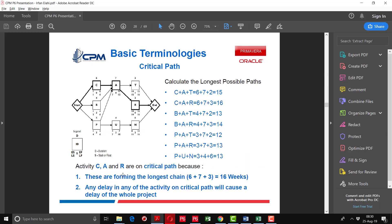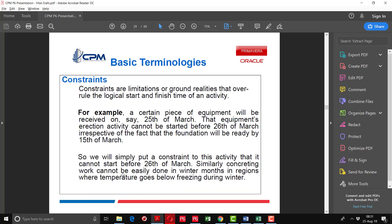Here is the determination of the critical path. We calculate the longest possible paths. There are different paths shown here. You can see that the longest duration is 16 weeks. Activities A, C, and R are on the critical path because they form the longest chain at 16 weeks. Any delay in any activity on the critical path will cause a delay of the whole project.